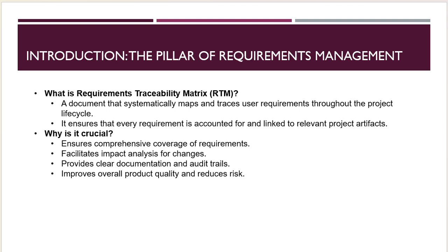So all the user requirements we should prepare in an Excel document where we write down the requirements, and in the columns the requirement and then each phase of that requirement, like requirement gathering, requirement analysis, design, development, testing, deployment, or feedback, all these things.